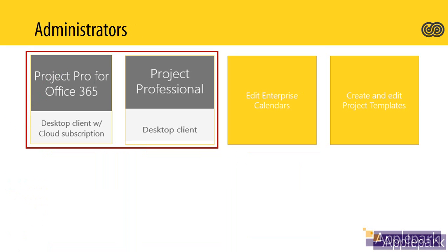Administrators depends what your administrators need to do. Administrators of your Project Web App site may need Microsoft Project or a version of the desktop client. There are two reasons they need that. One is to edit the calendars. If you're using anything other than the standard calendar, Microsoft's standard calendar is we work Monday through Friday, 8 hours a day, 8 o'clock till 5 o'clock, with an hour for lunch. No public holidays in there.